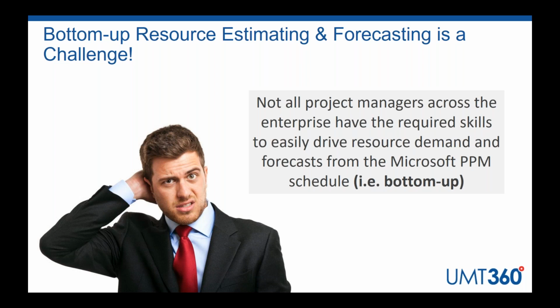Because one of the overarching challenges we see when deploying Microsoft PPM across the enterprise is to successfully estimate and forecast resources through the life of the project requires most things to be driven from the task level. Now, that makes a lot of sense, but it assumes that all the project managers responsible for managing the execution are well-versed in the Microsoft PPM schedule, Project Professional. And that is not the case as you move across the enterprise.